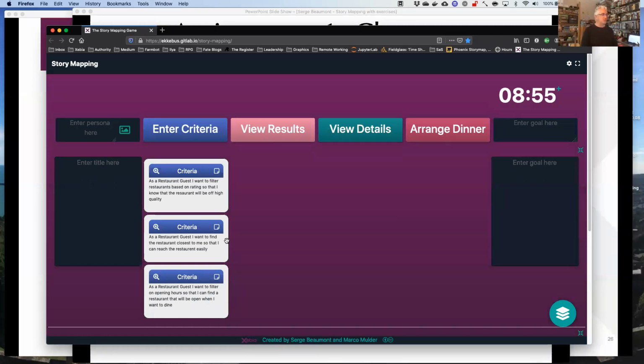However, what is important, and that's what the title here at the left is for, is this: if you consider this thing here to be a user story, then this thing at the left representing the whole slice is your higher level user story. In Jira, you would see a mapping between user stories and epics. In Azure DevOps, you would have story, feature, epic. It's the first level up, whatever name you want to call it. So maybe a first version would be: find restaurants close to me.